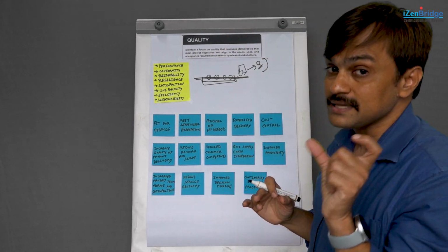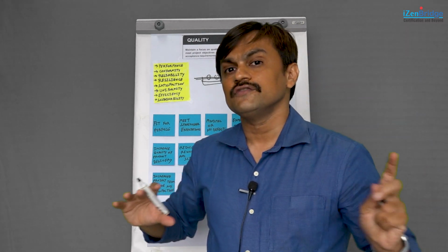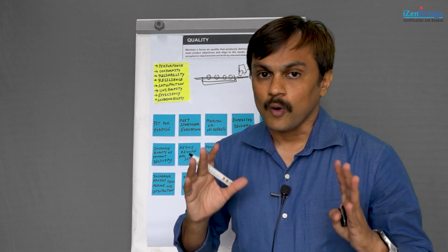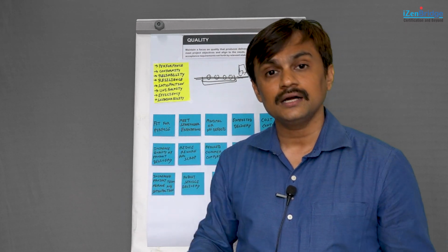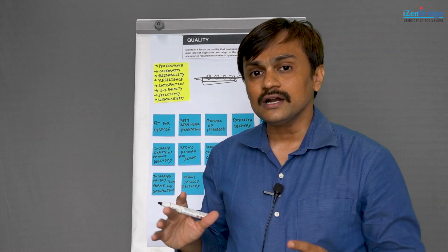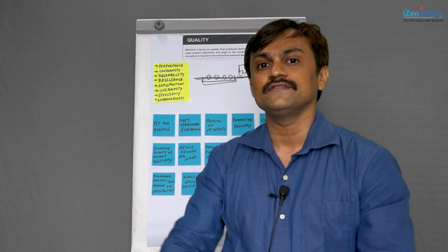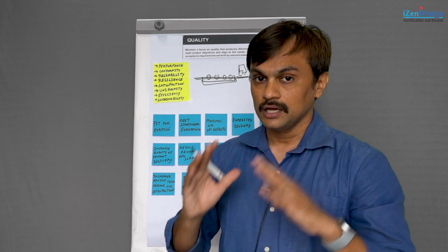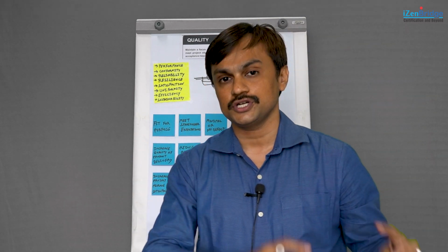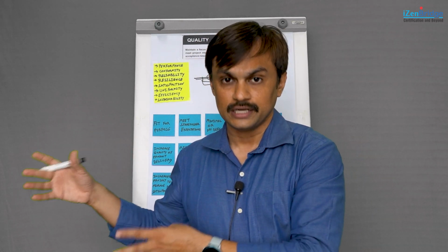Now, the word build is important. It is not that we will do something and then check for the quality. That is not the idea. The quality needs to be designed, planned. It should be a first-stage job rather than a last-stage job. It is not that I make something and then see whether it meets a requirement or not. Rather, I make something which has a complete design and planning consideration that it will meet it, so that I have less rework later on.